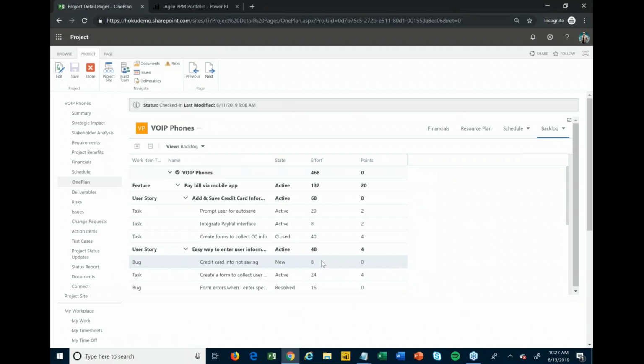One thing that we find is even if you're connecting up to an Agile tool and you're managing this project in an Agile way, a lot of times people still end up keeping a separate project schedule or release plan or release timeline, if you want to call it that, separately from the backlog items. The reason being is most people only plan out a sprint or two ahead, so it's really hard to tell exactly when you're going to be finished. You can look at burn down reports and things like that. That's assuming that you have everything already in the backlog, and as you're going through the Agile process, a lot of times you're continually adding things as you get feedback from stakeholders and ideas and so on and so forth.